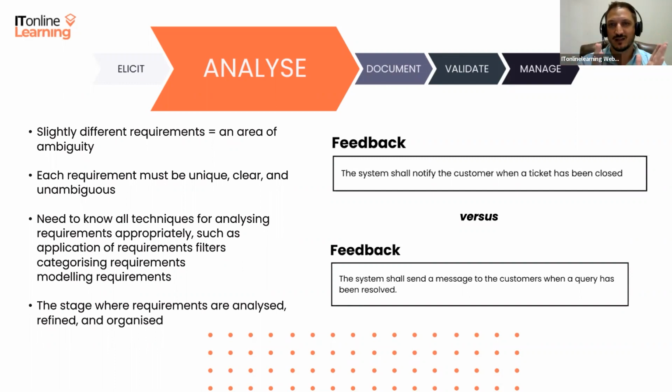And we will define that in our requirements document so that when the developers are developing the product, they know what to do first, or what to focus on, because they may get to a point where they might run out of time. And then they might say, look, guys, these requirements that you've stated here, you've said that they're low priority, and we're just going to leave them out of the system for now, because we've gone over budget and over time.